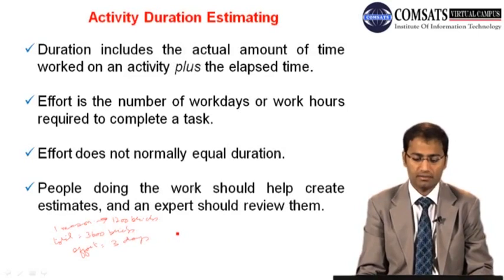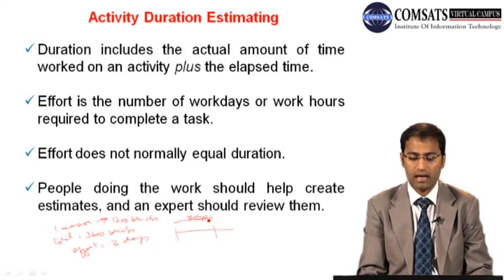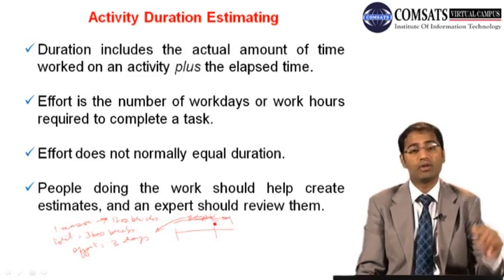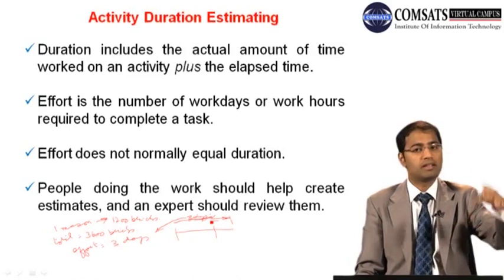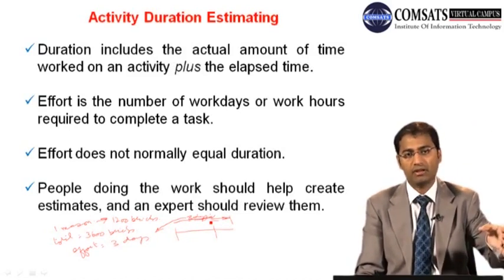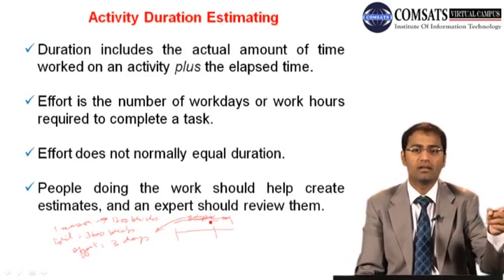And why is that? So this part is 3 days, and that is effort. Now what is this? This is elapsed time. You have to cure it. The mason is gone, the brick has been erected, but you are actually curing it.